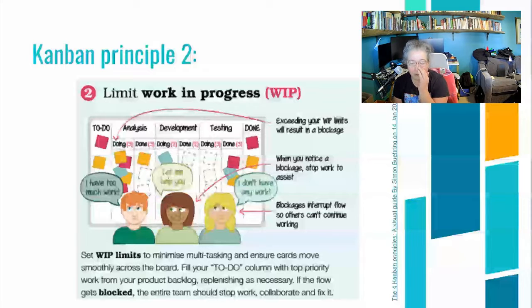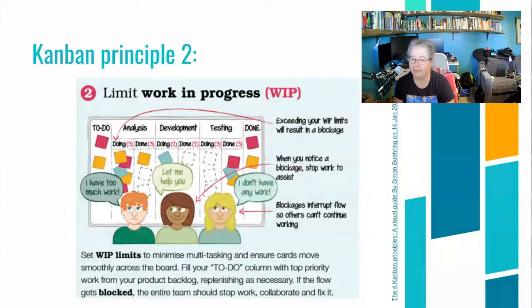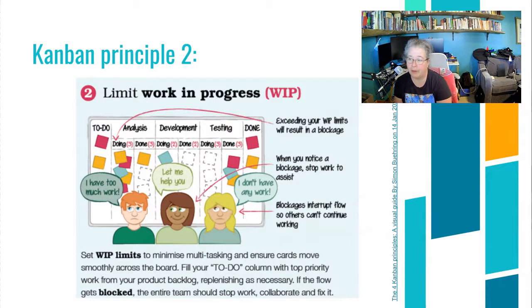Kanban principle number two is to limit how much work is always in progress and get it done — move it to the done area. These little speech bubbles represent common things that happen in collaboration: I have too much work, I don't have any work, or how can I help you? These are called blockages in Kanban. So Trello helps us move through those blockages.